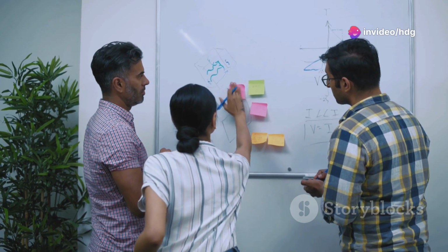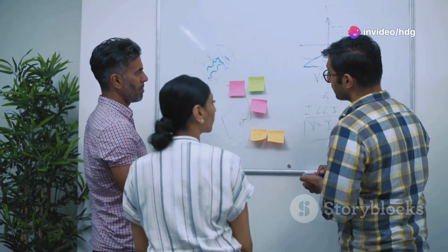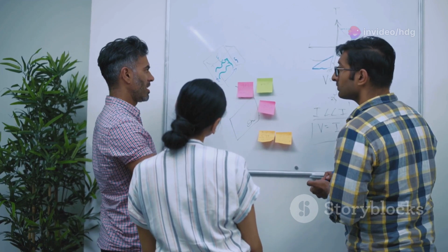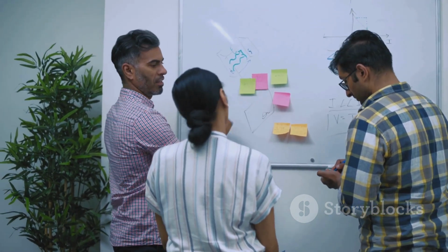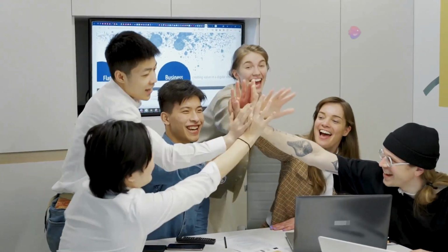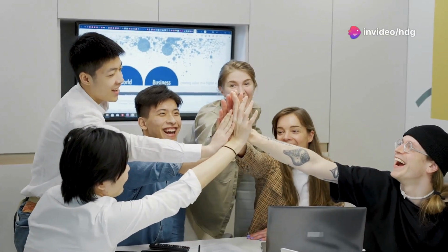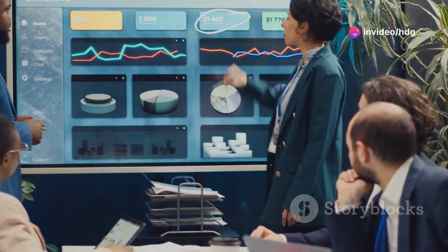Daily stand-up. Next up is the Daily Scrum. This is a short, 15-minute meeting where the team checks in on progress. Every day during the sprint, the team gathers to share what they did yesterday, what they're working on today, and any obstacles they're facing.